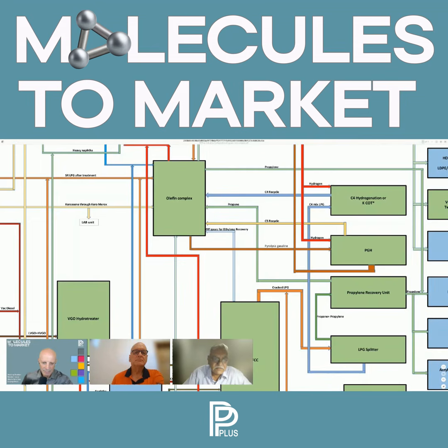We found this strategy is very good, because if you do that, there is a lot of standardization which can be achieved in multiple units. Packages become more streamlined. Stream integration is much better, and only one or two small units like delayed coker and maybe the aromatic extraction are the only two units which need to be outsourced for the managing licensor. At best, UOP may have to outsource Prime G also. That's it. So I think the refinery block is fairly in control.